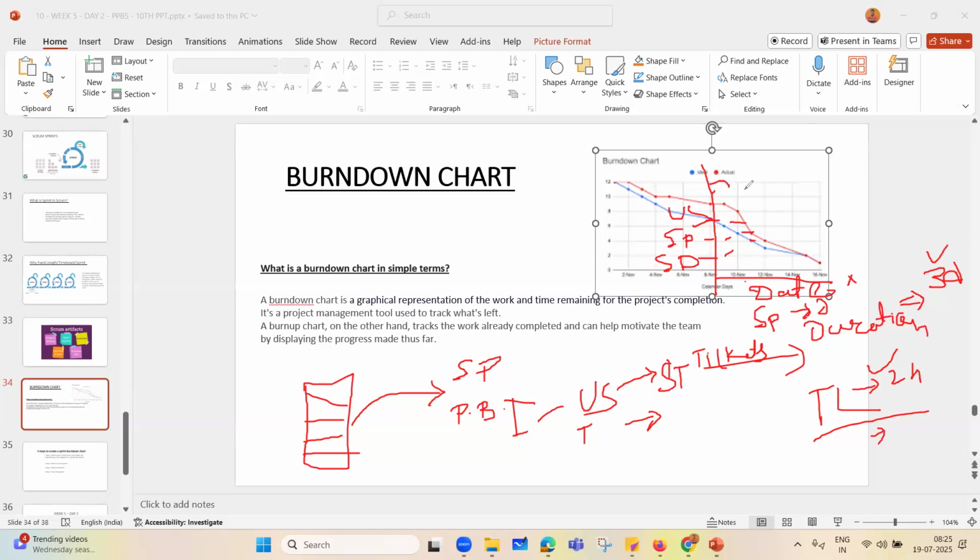If some coders are doing certain coding activity and just entering the story points, the work left will not be visible during the initial level of the sprint unless concrete work is done. Everyone will be contributing, the coder will be coding, the tester will be testing, but still some of the user stories will not be completed.